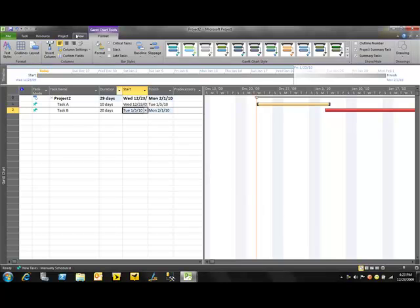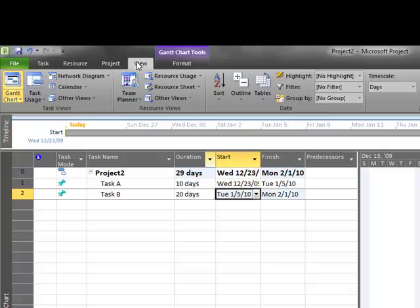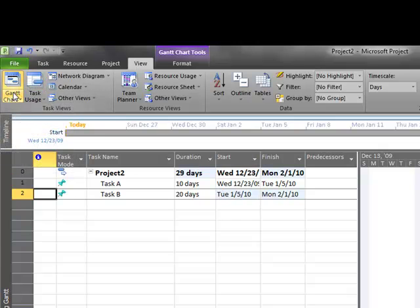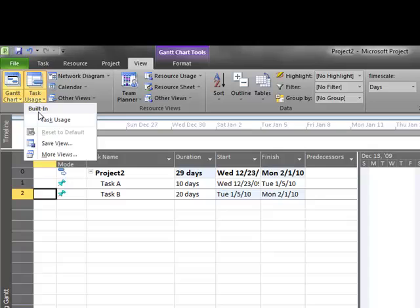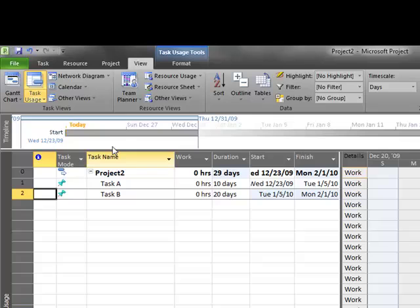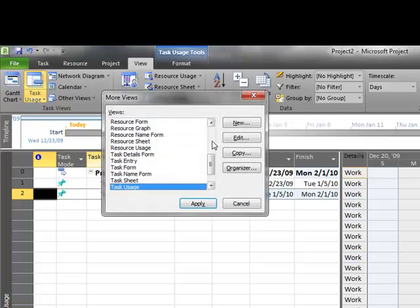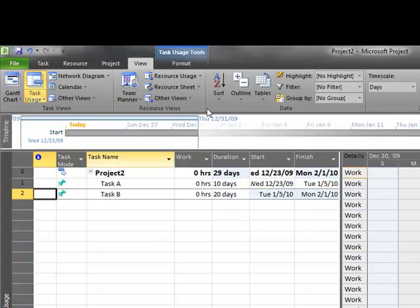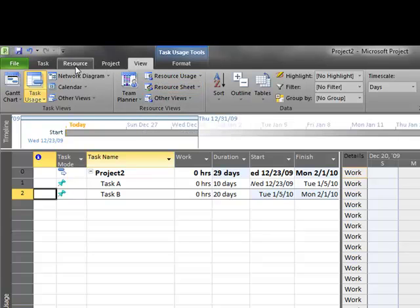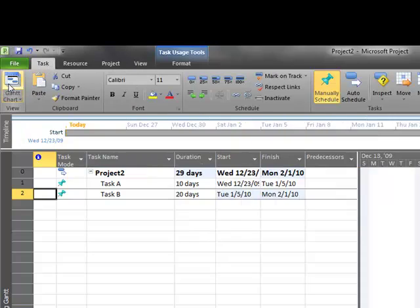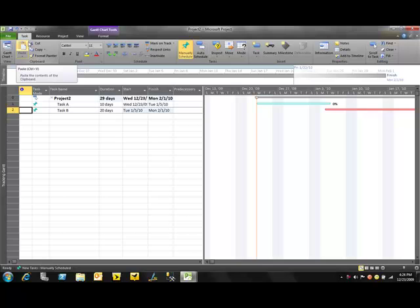I still have the ability to create my own views, so if I click on this View tab here, you can see I can go to the Gantt chart, I can go to a Tracking Gantt, I can go to Task Usage Views. I still have all of these views, but I can also create new views here as well. So if I, for example, click on Other Views, More Views, I can click on New and create those new ones. Same thing as we did in the past, but again, more well organized based on the types of things that we want to do.